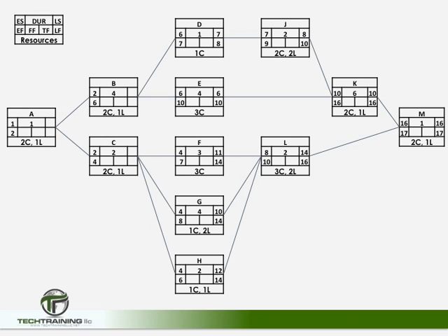And we can now fill in the late finish for activity D, which is 8, and its late start, which is going to be 7. Now, of course, we see that we have a similar problem as when we were doing the forward pass. Both activities B and C have more than one succeeding activity. Therefore, we have to determine which of the late starts will become the late finish for these activities.